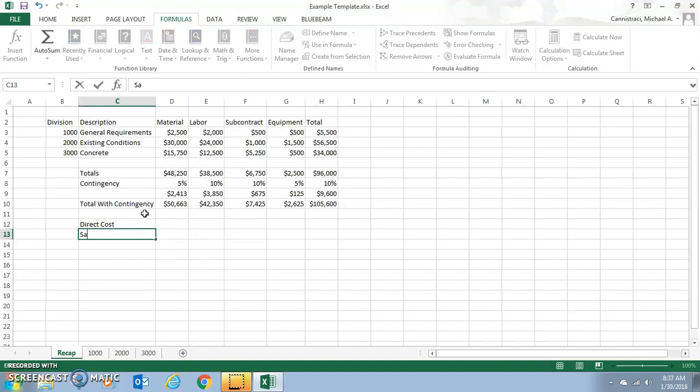Tax or sales tax, right? Every time we do something, we have to make a donation to the state. Tax changes. If it's a capital improvement project, maybe it's tax on material, or there might be tax only on temporary installations, but things that are permanently installed, there's only tax on material. It could be a tax exempt project. So we need to be able to account for tax in our number.